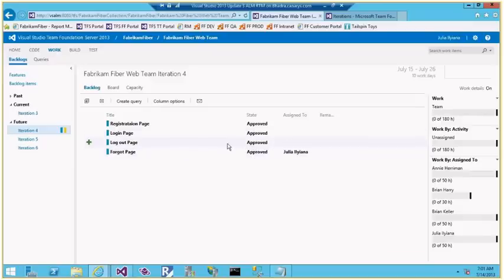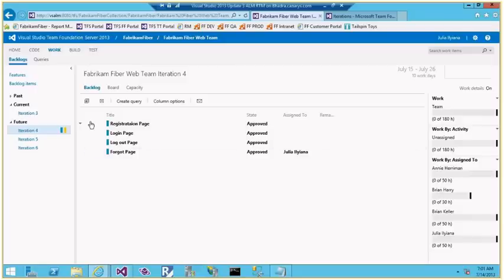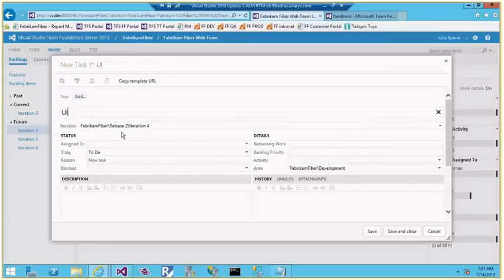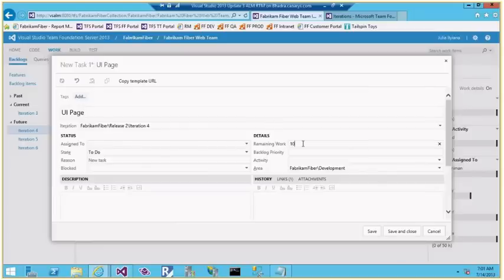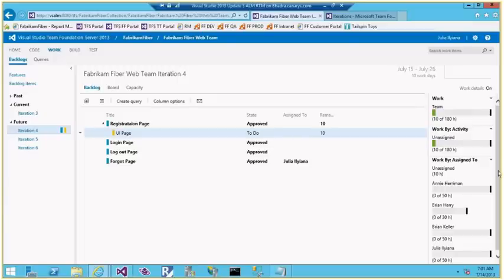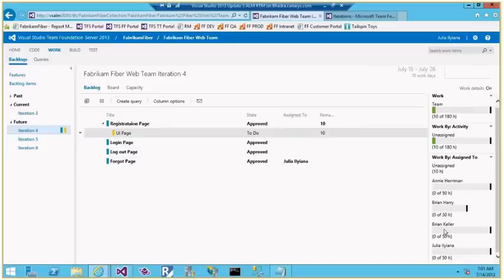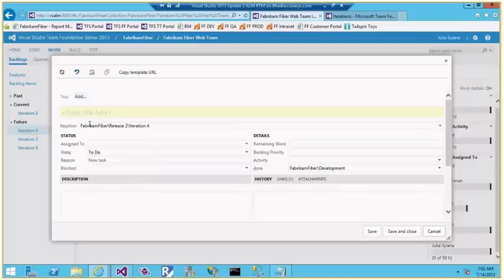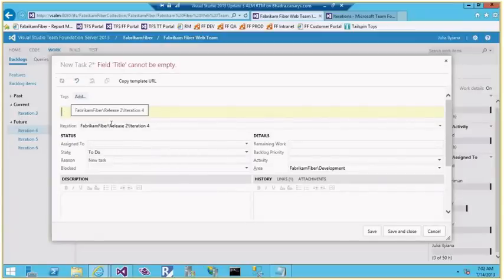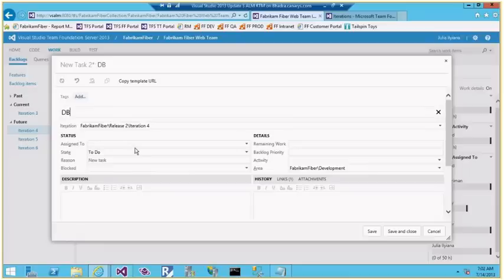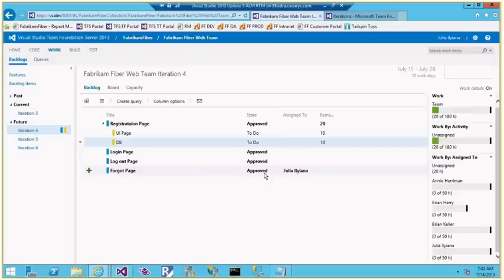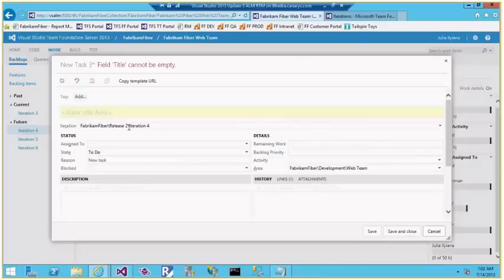Going to Iteration 4, some items are assigned and some are not. I need to create tasks for the developers — Amy, Brian, and Julia. For example, for the registration item I'll add a UI page task estimated at 10 hours. As soon as I do that, the team's capacity bar fills up, but it's not yet assigned to a specific team member. I can add another task for DB work, also 10 hours.